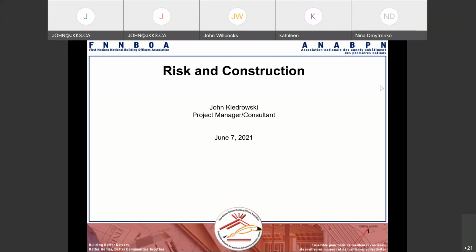It's part of what you said, going through an insurance broker to attain it. Typically, the cost to the contractor would be roughly 10% of the build costs. So if we take that $400,000, it could be in the range of $40,000 of bonding that the contractor would have to put up. Again, the other side of that is you have to be careful that you don't put out too much money.